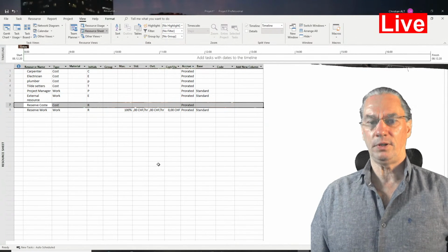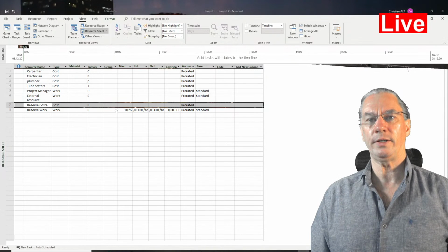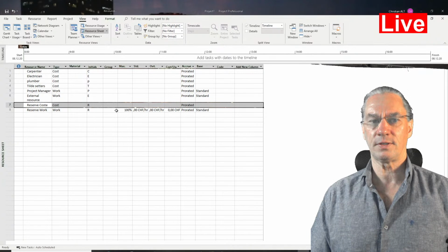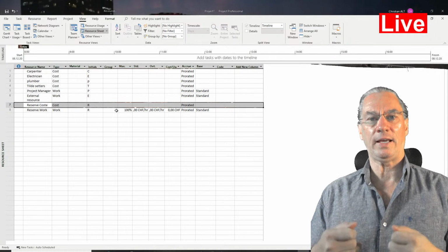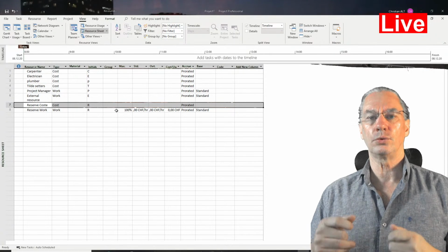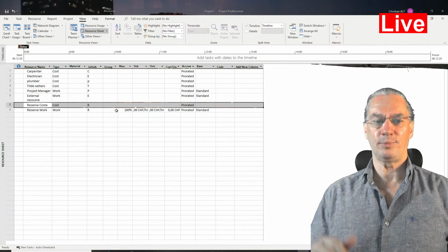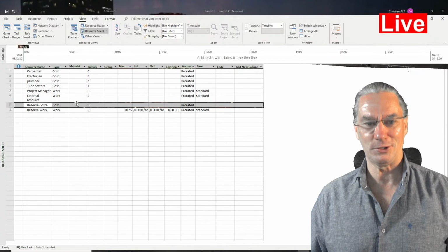To remember, if you saw the beginning of the video, I tried to allocate such a resource to a task. It refused. It said that that kind of resource can only be assigned to the summary task of the project. And I had some difficulties to find that summary task, but in the end I found it.